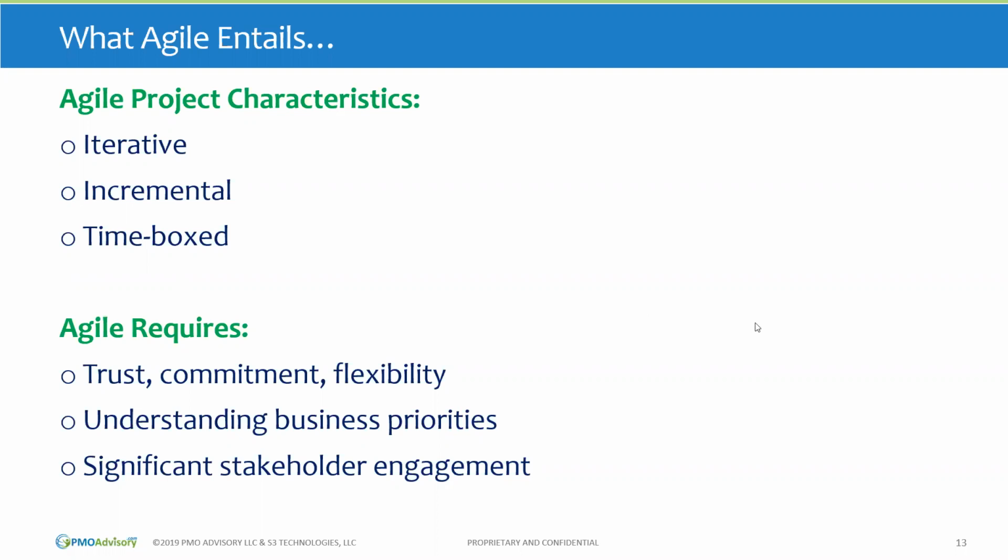very quickly, the difference between iterative and incremental. Incremental is for, like I gave with that example, the 8-week class. I'm delivering the class in 1-week increments or units or modules. And with iterative, I'm creating something and then I'm getting feedback and then I'm making changes to it. So I always think of the cup that somebody uses maybe for coffee, and then they say, oh, I want to insulate it, and so you add insulation, and then you show them that and they say, oh, that's great, but I want a handle and I want a lid. And so it's more like a prototyping kind of way of doing things. So you iterate, and with each iteration you get closer to the end product result that the customer wants.